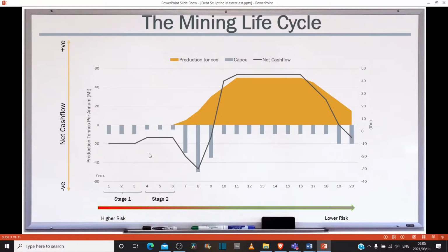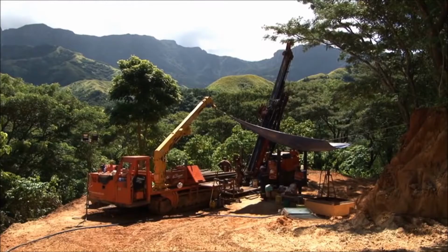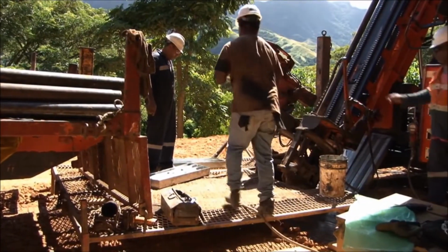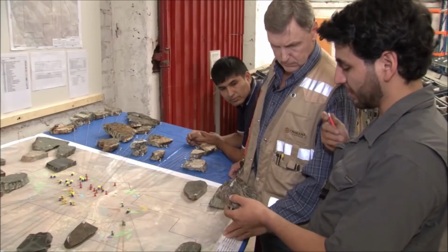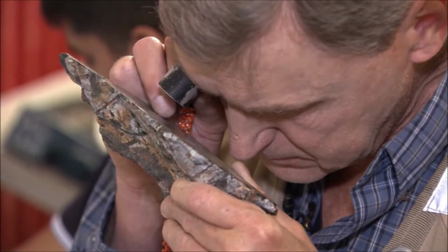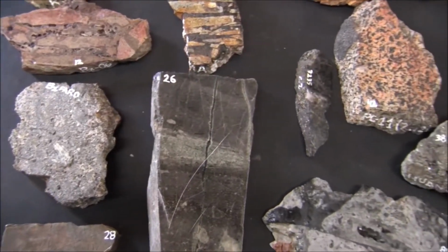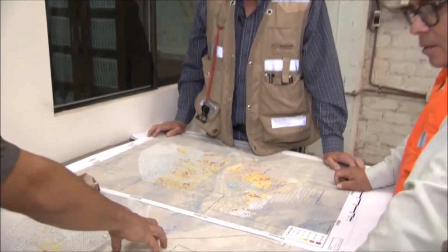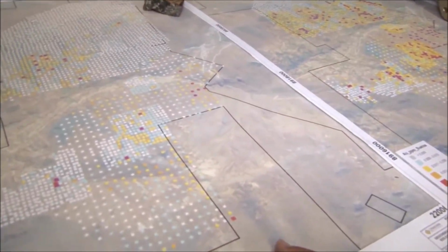After stage one, you move to stage two, project evaluation and fundraising. This is where you start with a pre-feasibility study. Your pre-feasibility study is where you haven't really done sufficient drilling. You can drill an ore body, maybe you drill a core there, and a core is basically where you drill into the ground and then extract the stone to see where it contains the ore that you want to mine. Depending on how much drilling you do, if your drill holes are very widely spaced, you actually don't know what happens between this drill hole and this drill hole.